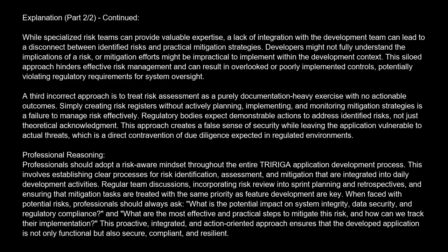Professional reasoning. Professionals should adopt a risk-aware mindset throughout the entire TRIRIGA application development process. This involves establishing clear processes for risk identification, assessment, and mitigation that are integrated into daily development activities. Regular team discussions, incorporating risk review into sprint planning and retrospectives, and ensuring that mitigation tasks are treated with the same priority as feature development are key.